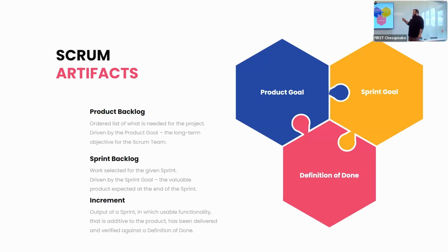That gets filtered down into the sprint backlog. The sprint backlog is really owned by your developers or your Scrum team. It's something where they'll look at the priorities that the product owner created. They'll identify the top 3 or 4 or 5 based off of their capacity.